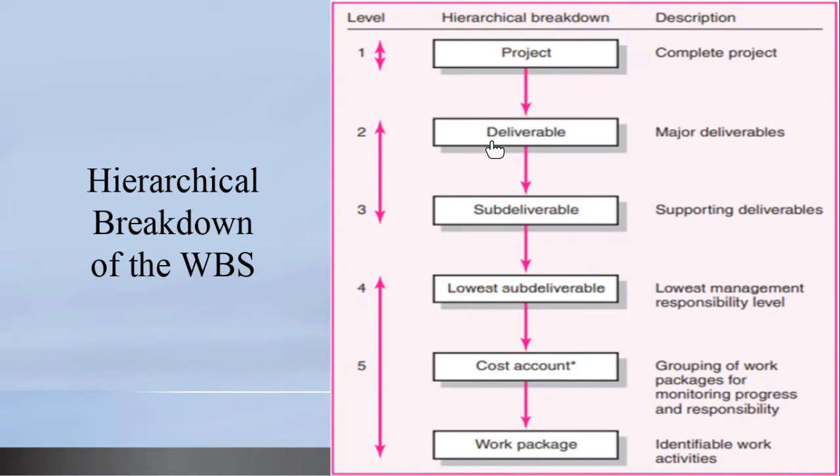The next level under will be the deliverables you have broken down. So let us imagine the same UTech engineering rebuild project I described just now. The superstructure would be a deliverable. The air conditioning system, fully functional, would be a major deliverable. The windows and doors installed and fully operable would be another deliverable.